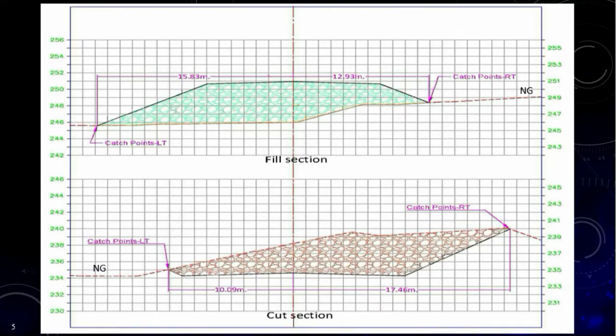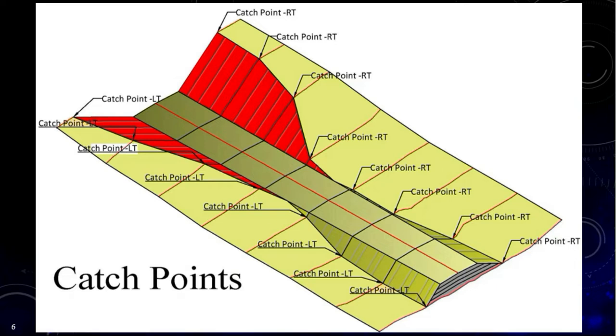It is where the side slope of the road cross section meets the natural ground, right and left of the road sector. They are not at fixed horizontal distances laterally from the road axis due to the different levels along the road profile grade on the one hand, and the difference and change of the natural ground levels on the other hand. The surveyor sets out these points to form an irregular longitudinal path to both sides of the road.